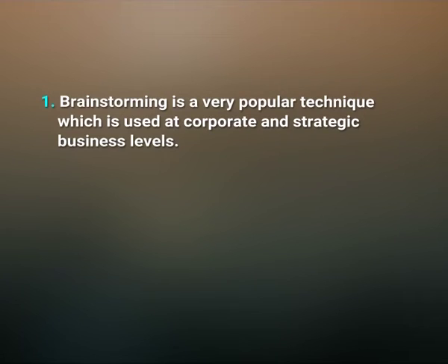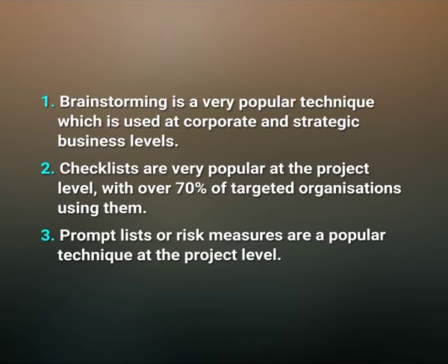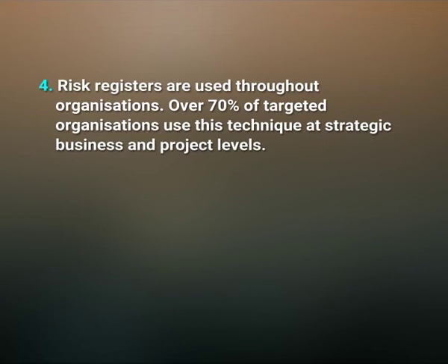Number one, brainstorming is a very popular technique which is used at corporate and strategic business level. Checklists are very popular at the project level, with over 70% of targeted organizations using them. Prompt lists or risk measures are a popular technique at the project level. Risk registers are used throughout the organizations. Over 70% of targeted organizations use this technique at strategic business and project level.